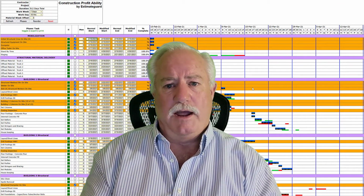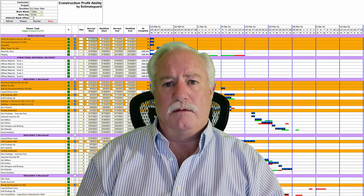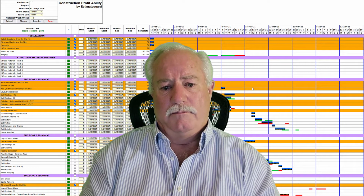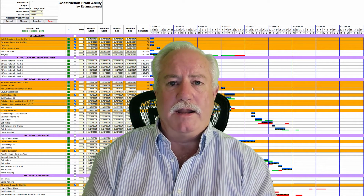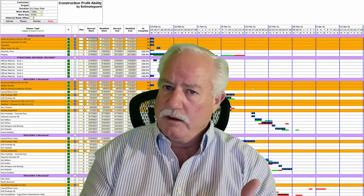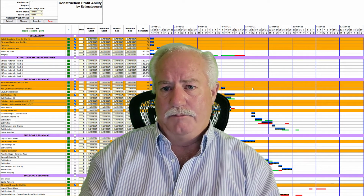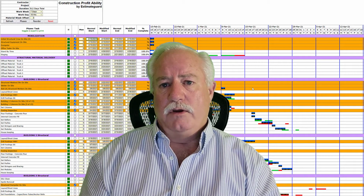You take one task out of every series of tasks, you go through it, you discuss it, you pick the best material from a cost standpoint and from a labor standpoint. Everybody needs to buy in on it. You all agree. And then you roll on to the next task in the next series of tasks. And you go through this and you fine tune it.